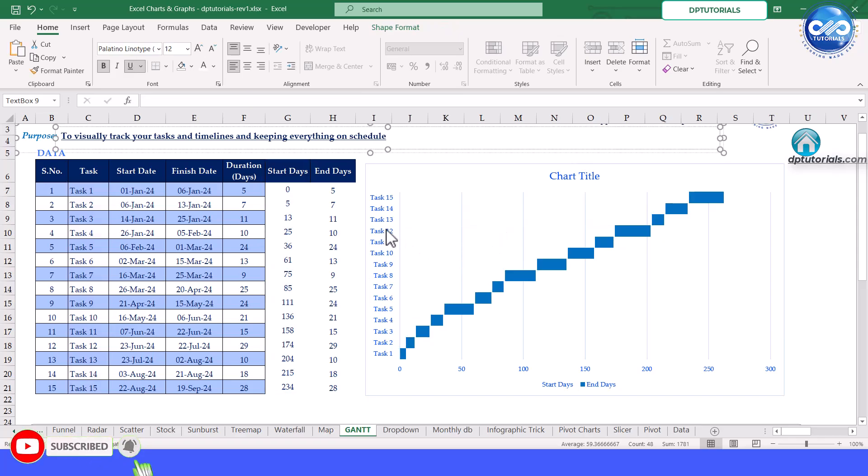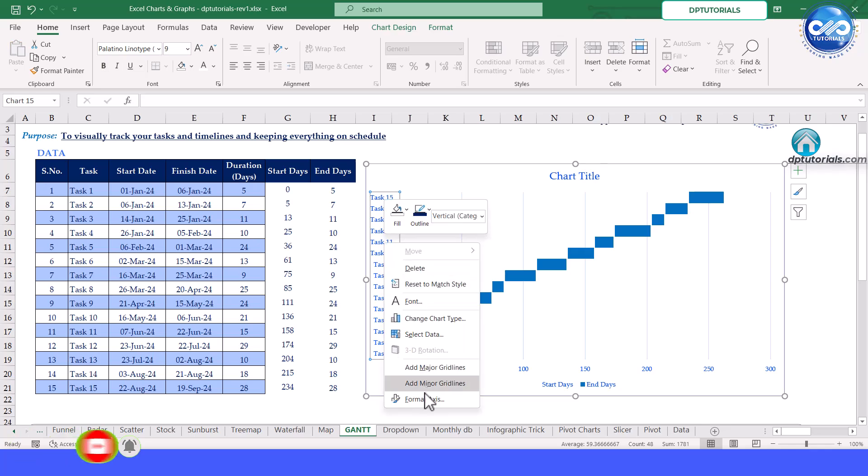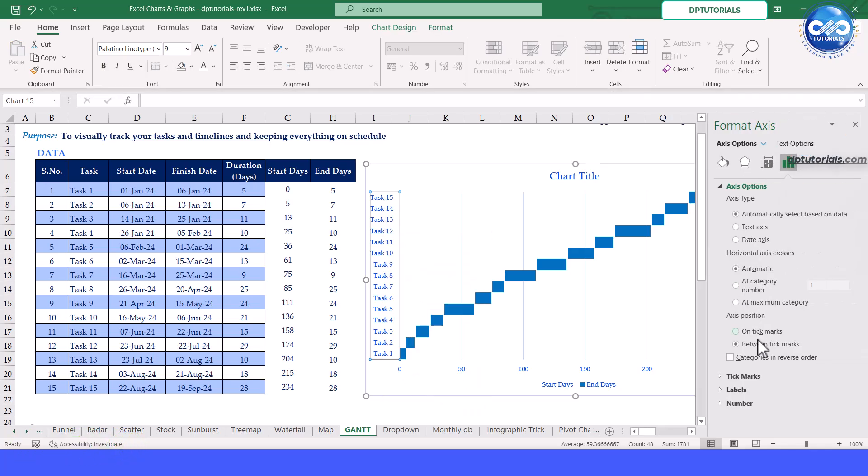Adjust the task order by sorting the rows in reverse, so tasks are displayed correctly on the chart.